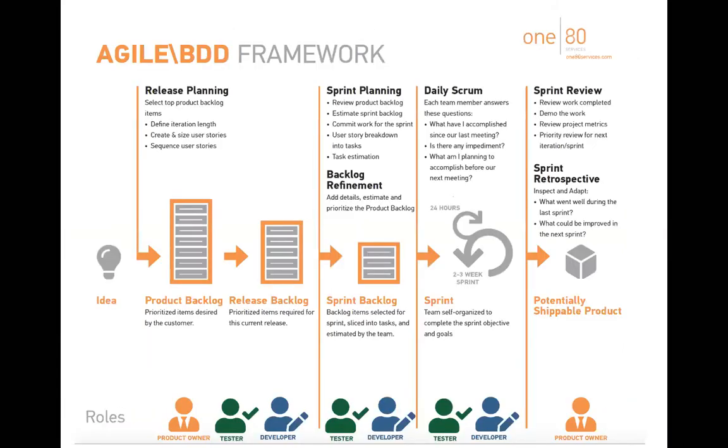So when writing behavior-driven development stories, the question I always get is, who should be involved in writing those? And the answer is, it's the same people that would be involved in writing normal stories. And there's a lot of confusion, even with normal Agile, about how often should you be touching a user story to get it complete, right? Do you touch it once and then hand it off to the team? Should you be redefining it always, right? And the answer is, a user story should be touched many, many, many times before a team gets it. You don't just write a one-sentence thing and a couple acceptance criteria and move on.